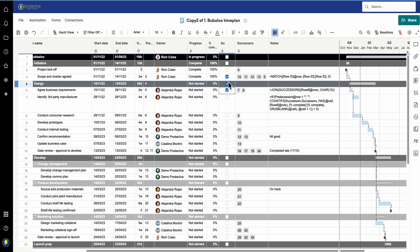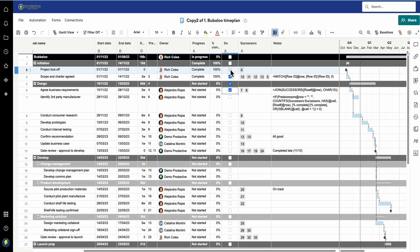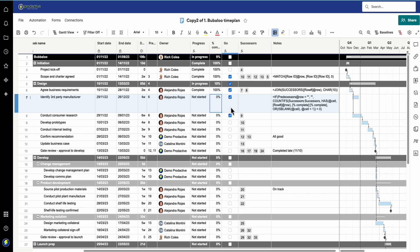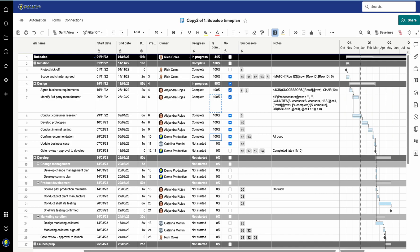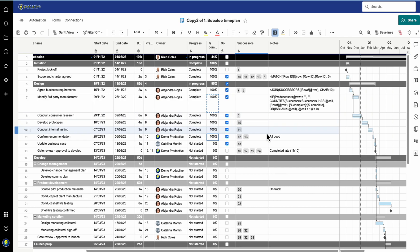Let's just test it. You can see now from the predecessors that these ones aren't showing ready to go. Well, because it's the start of the project, they are ready to go right from the start, so that's fine. But if I now go in and start saying these ones are 100% complete, you can see the tasks below are now aligning up to say they're ready to go. Let's just do a few more - that's ready to go. Copy and paste there - you can see ready to go, ready to go, ready to go, and so it's all working as planned.